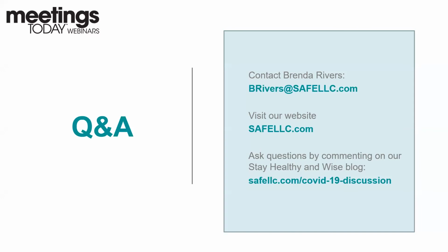But you have to know those conditions before you can negotiate with the hotel and the vendors. The same thing with the speakers. You have to have a force majeure clause that says you can get out if these conditions exist on this date, 2 months out, 3 months out, whatever you decide. If these conditions exist, then we will invoke our force majeure based on the COVID-19, and we get all our